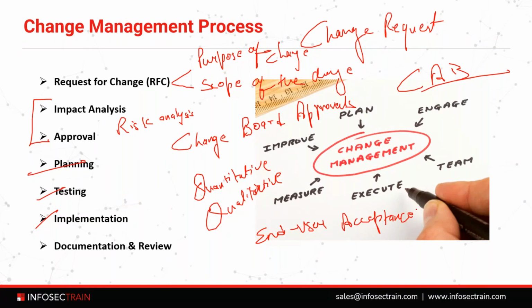First, change requests should be considered by stakeholders on the change board who represent end user or customer interest. A project that will have significant impact should incorporate user acceptance testing to allow end users to work with the updated system and suggest improvements before release. Training and education resources must be available before the change is initiated. So the support team must be ready to deal with incidents arising from the change as a priority.